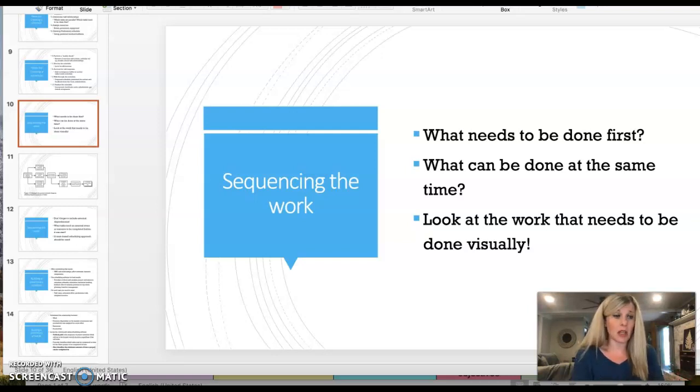That was very common. However, you want to make sure that the vendor is secured before you set up the music, maybe the DJ, right? Because what if the DJ is not approved to play at the space that you've actually booked? These are all, again, very contingent upon some certain steps have to be taken. Same with the catering. Many times venues have specific approved list of caterers, so you can't book the caterer until you have booked the venue.